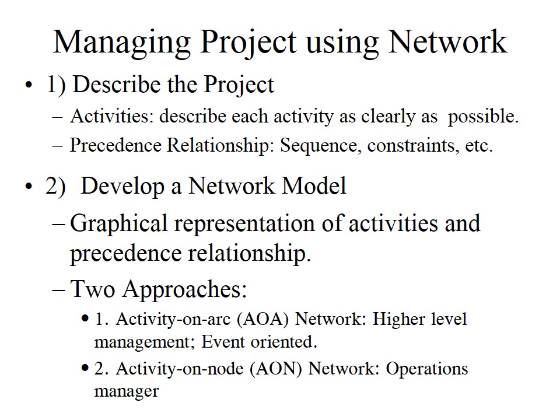There are two broad approaches: activity on arc and activity on node. Typically, mid-level managers who focus on activities tend to use the activity on node approach, the second approach, whereas the higher level managers are not really interested in activities per se, but they are interested in accomplishment, milestones, where they are in terms of accomplishing the project, and they use the first approach, where activity is represented on arc and nodes represent events or milestones.